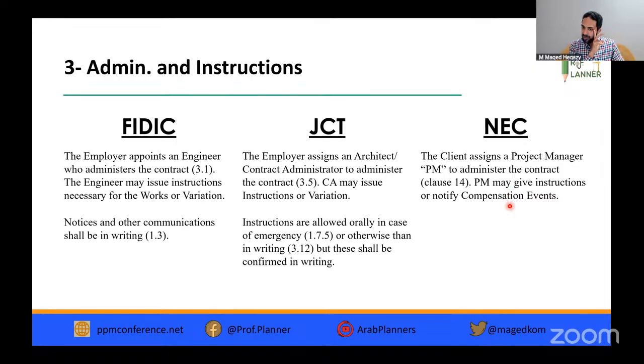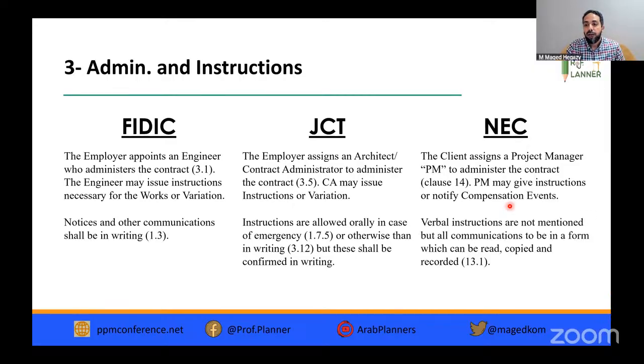It's called compensation events. It will be used for claims after that. Verbal instructions are not mentioned in the NAC, but all communication is to be in a form which can be read, copied, and recorded, which means to be in writing.